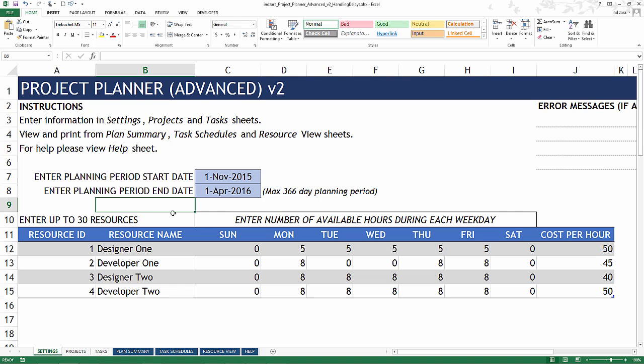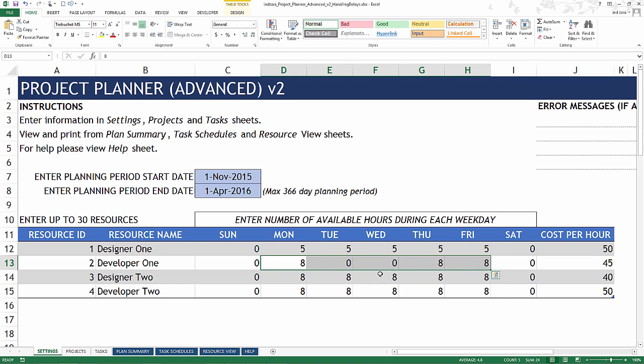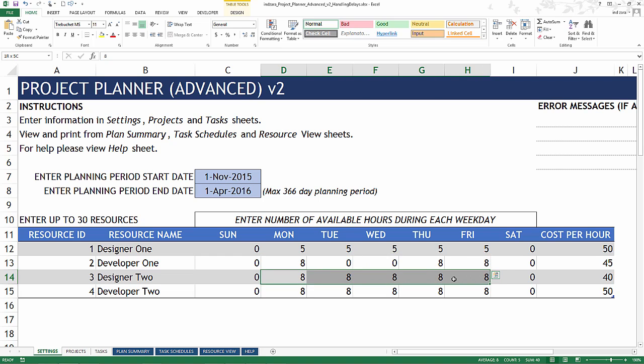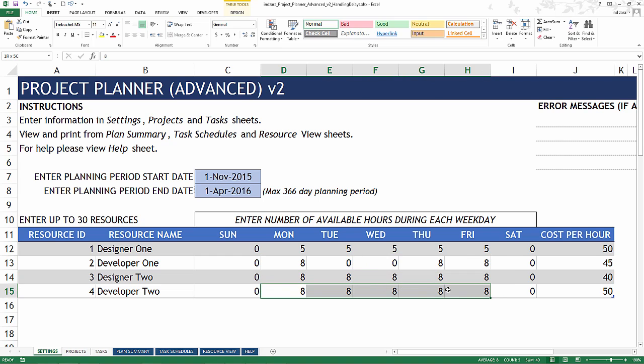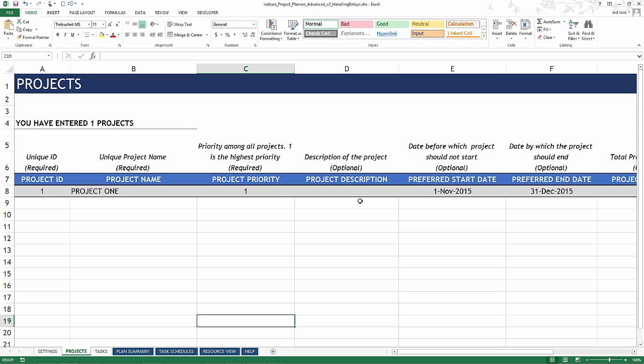Our project planning period is from November 1st to April 1st and we have four resources available to us. Designer 1 is available for 25 hours in the week, Developer 1 is available for 24 hours in the week, Designer 2 is available 40 hours during the week, and Developer 2 is also available for 40 hours. We have only one project with a preferred start date of November 1st and preferred end date of 31st December.